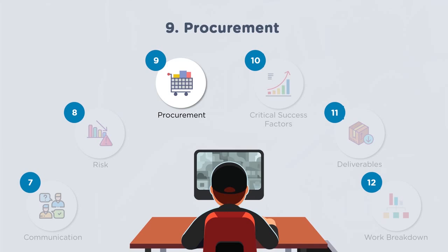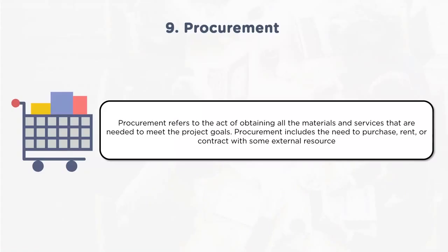To purchase, that has to happen from a specific supplier. You cannot go with every supplier. You should evaluate those suppliers, qualify the suppliers, and then select and onboard the supplier, and then get the services or products supplied by that particular supplier. While doing this, one has to understand what type of contracting they need to enter into.